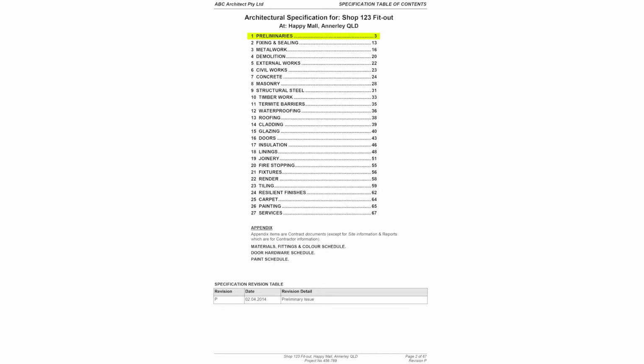No general requirements section exists. Some say it is for subcontractors and preliminaries for the head contractor, but a technical spec is needed by both. Head contractor specific detail is best in the head contract.